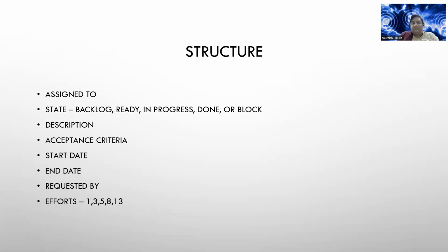If it is a very complex story, who will decide that? Developers will decide it. You are working as a project manager, you cannot decide that. Only developers will give their opinion, like, Saurabh, it is very complex, can you please give it as 8? Or you can give it as 13.